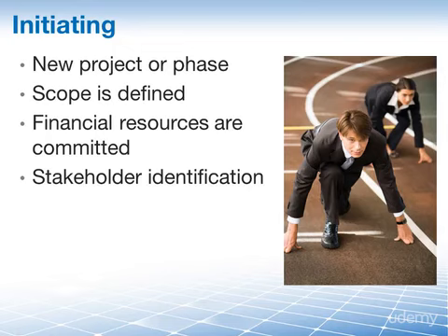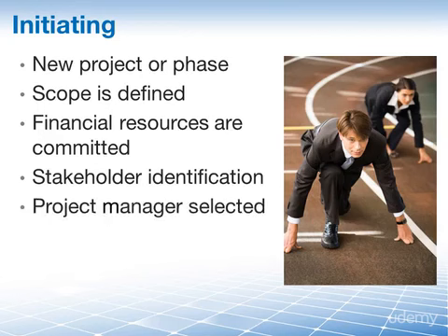If the project manager has not yet been selected, then he or she should be chosen in this process group. Would be a good idea. At the latest, he or she should be chosen in the next process group, planning, but it's always best to assign them here during initiation.